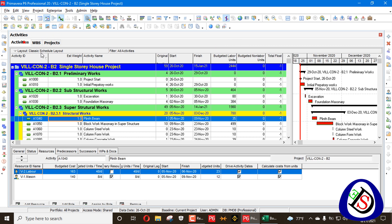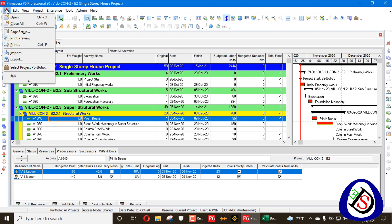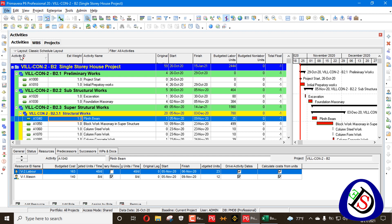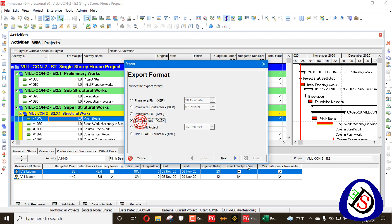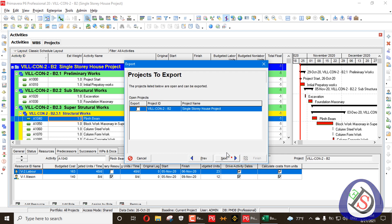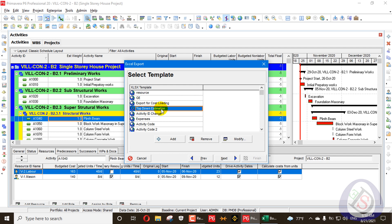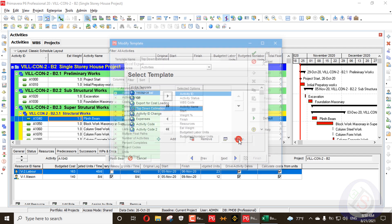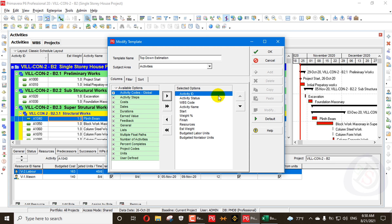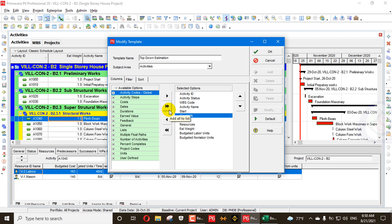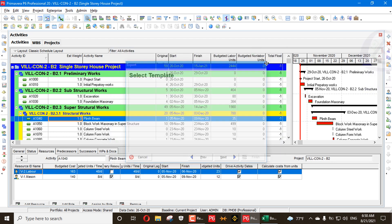For activities, we can import but there is a trick — we cannot import directly. I'll go to File, export this as an XLS file, select Activities, then Next. I have created a top-down estimation template. I'll modify it to show what I have added — in activities, under 'Weight Percent', I have added a weight percent column.